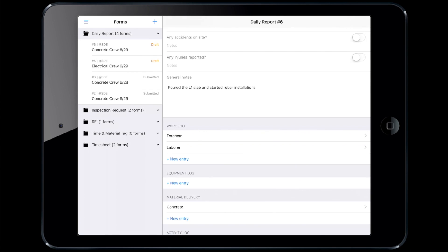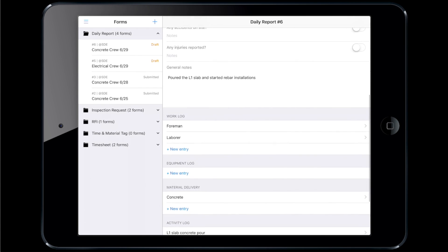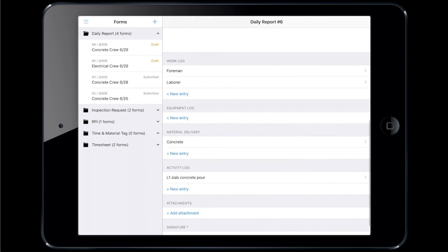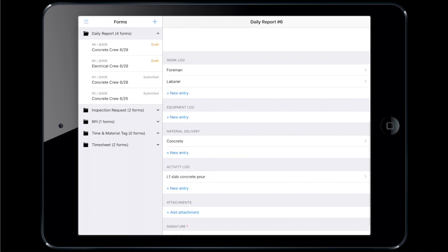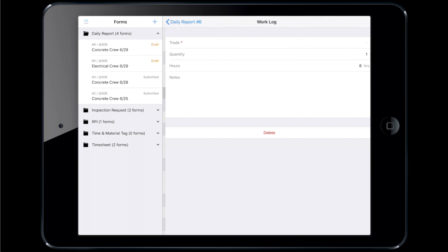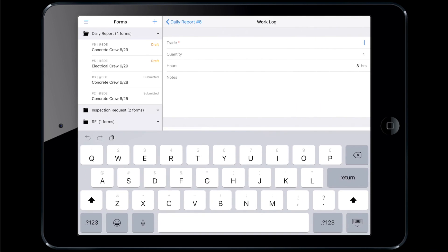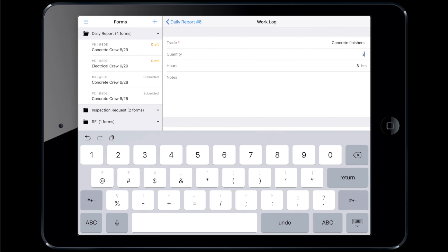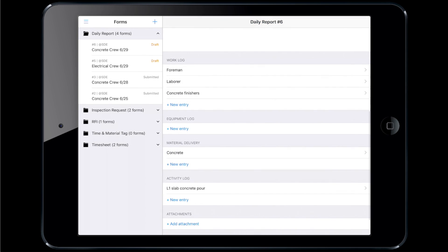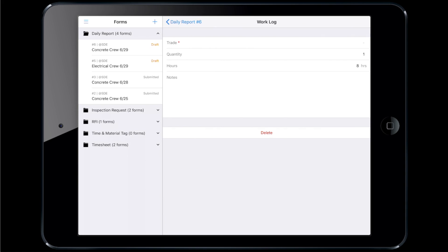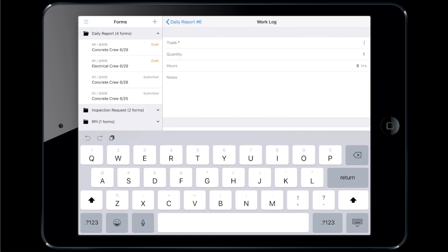Moving on to the work log, Steven records who worked on the project, how many hours they were there, and any additional notes. By selecting Add Entry, you can break down the work by individual or by trade. By default, each entry is one person for eight hours, but you can customize it however you want.